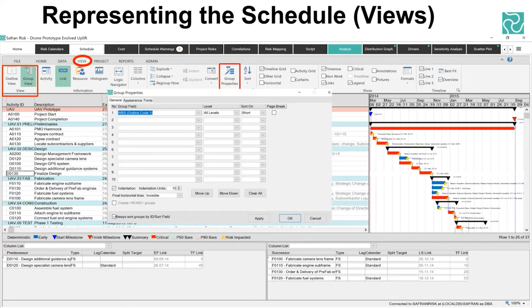So you click that and you would then be able to start saying, well, I want to see things ordered by first WBS and then I want it by chronological or subcontractor or some other user defined field. So there's a lot of versatility in that, and it actually has some relevance to how you do risk mapping, because it means that you can take an estimating uncertainty value and apply it to everything within a particular geographic region, or you could reorganize your data, slice and dice in a different way, and then map a risk or an estimating uncertainty to everything for a different purpose, for a different reason. So it's very flexible.